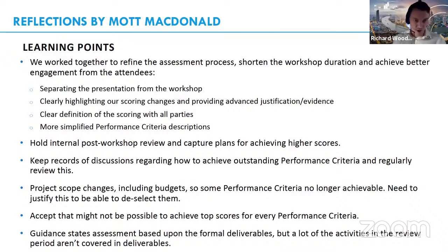Another thing that I personally have done and found very helpful is a pre-assessment scoring before the workshop, as was mentioned earlier. Obviously now I'm reviewing the previous scores from the previous workshop and considering, have I improved, or as a team, have we improved on those performance criteria? So if I do think we've improved, I clearly highlight that change on the sheet, and then I provide written evidence, justification of why, and then I give that to Kunkitima.